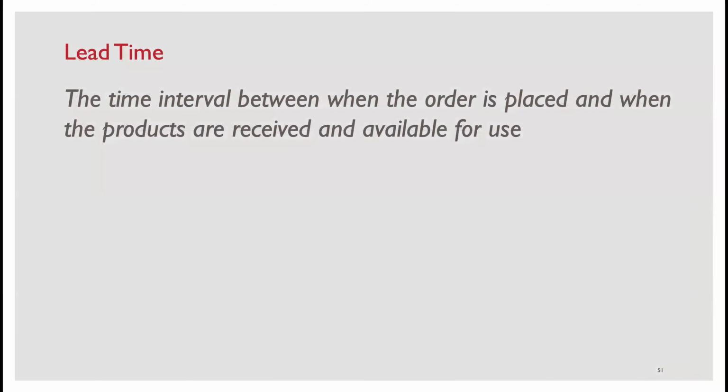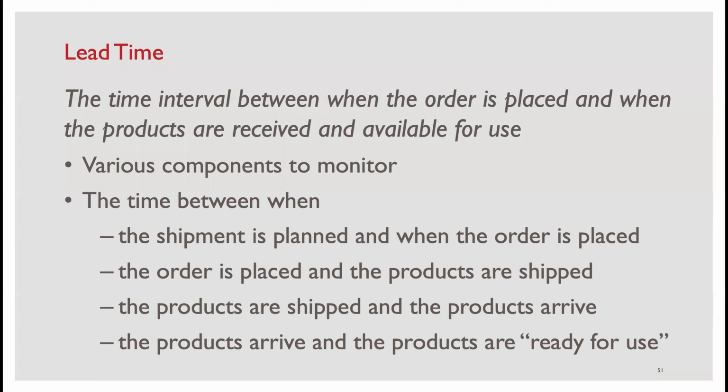So remember that lead time is that time interval between when an order is placed and when products are received and available for use. Also remember that there are several steps that are included in the overall lead time. So we want to monitor each of these steps separately. This may help us improve the process moving forward if we understand the lead time variations.